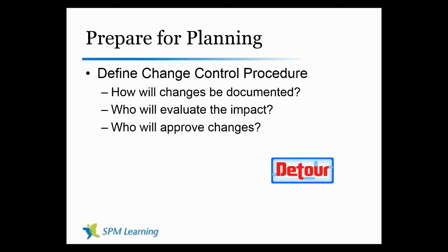Now, we are going to have challenges on our project. We're going to have issues. So this will lead to changes, and we need to consider how we are going to deal with those changes. Working within your environment, you probably have a change control process already, so leverage it. Don't reinvent the wheel. Right? So how will the changes be documented? How will they be evaluated? Who's going to make those decisions?